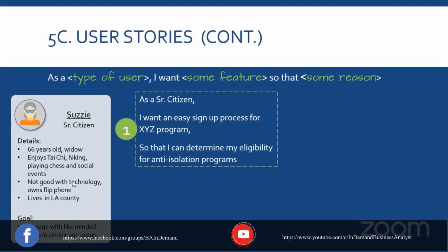And then individual user stories under those features would be what are the sign-in buttons, how do they use them, where do they take them, what are the different events that are going to happen on this page, what are the pictures, what is the logo, the color scheme. So those would be all requirements. So epic is the big picture. Features are how we're going to get to that big picture. And then the user stories are what do these features do and how do we get there? Yep. Thank you. No problem.